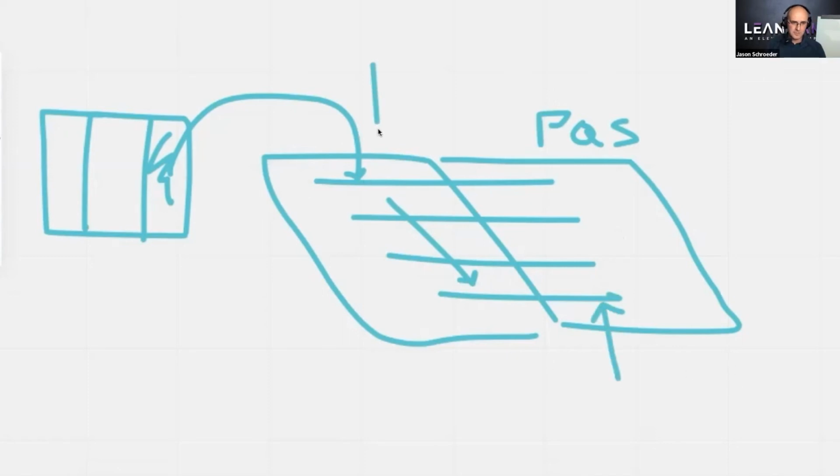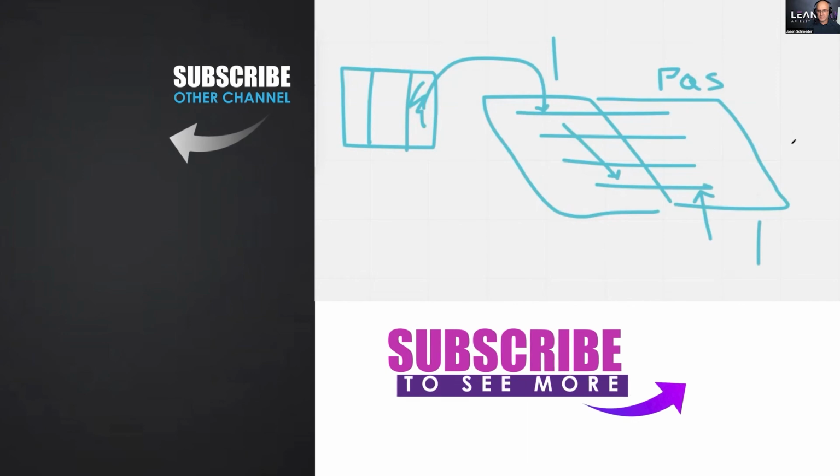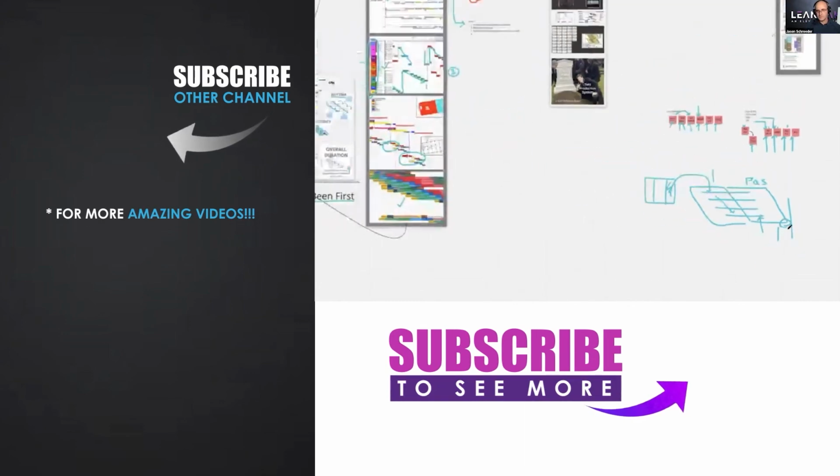You may have a pull plan for half of your schedule and the other half is the project team, but you have to create the schedule as soon as you possibly can early in pre-construction. Otherwise, we get ourselves in trouble and we don't accurately buy out the right end date and we're not tracking the proper flows. So hopefully that answered that question.